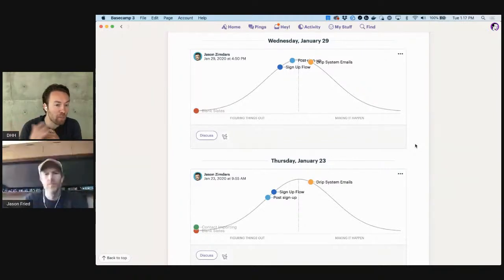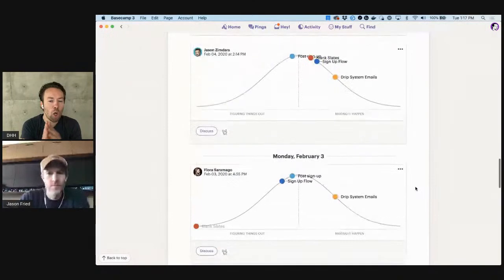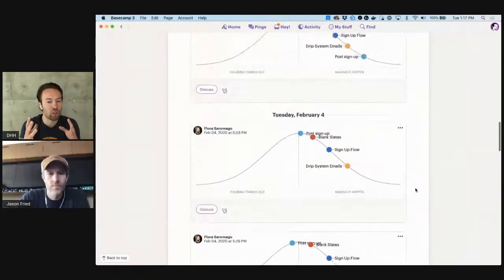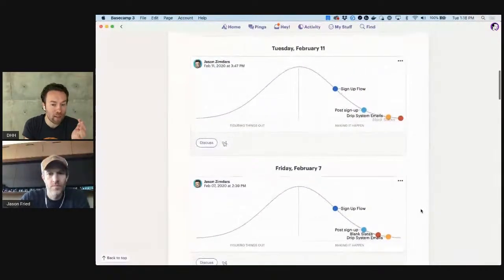It's not checked off. It may have the most amount of to-do items on it when it reaches the top of the hill, but you have a pretty good idea that this is it. This is the scope of the work. And now I just have to check things off. Now I just basically have to do it.